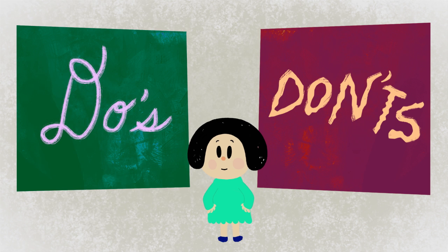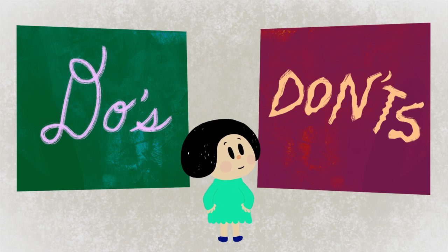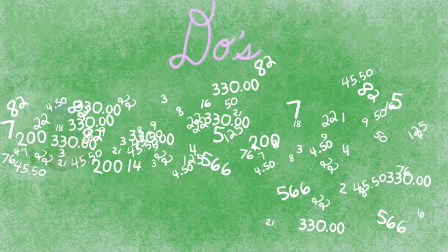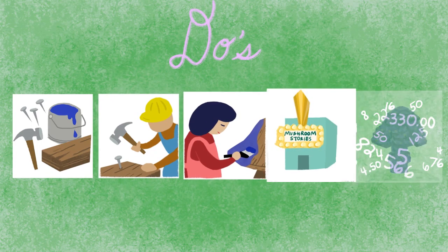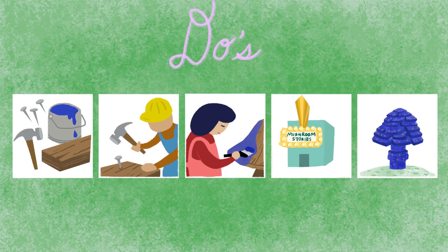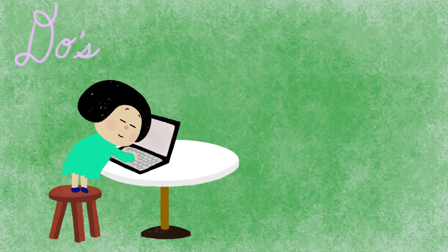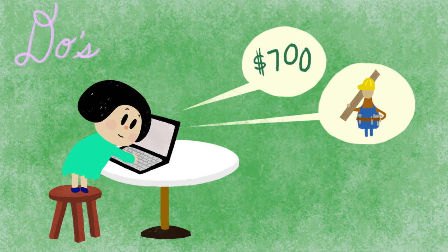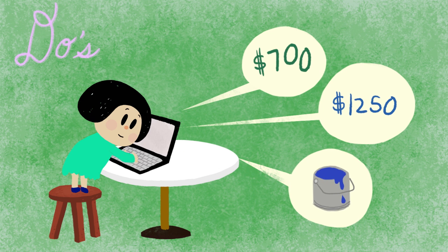Now for some tips which should serve as a guide for successful budget preparation. Try writing your budget in advance of the proposal narrative. This will give you a fairly accurate outline for the human, technical, and promotional needs of your project and could make your narrative easier to write. Base your expenses on realistic estimates and costs. This will take some time and research, so start thinking about your budget early in the project planning process.